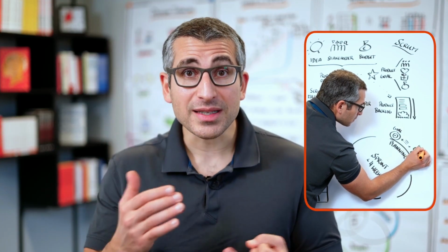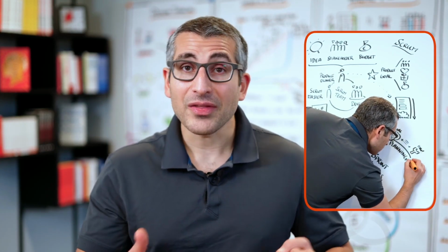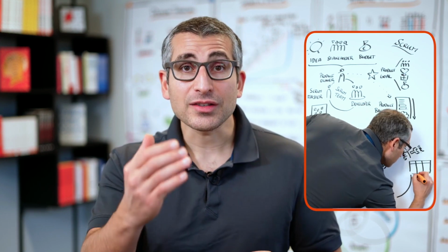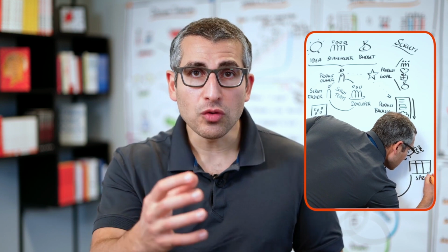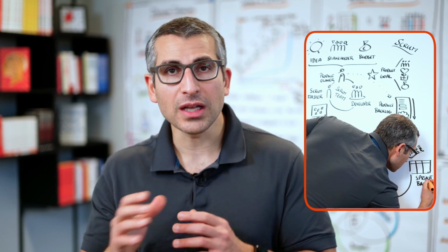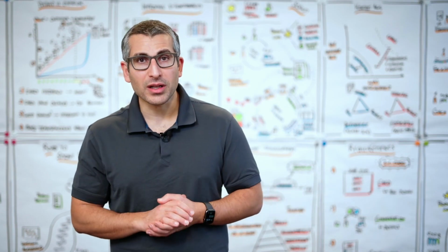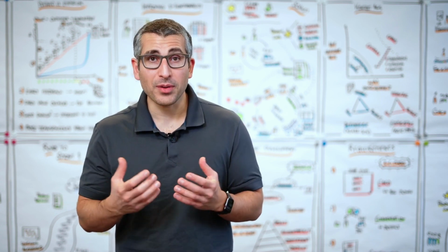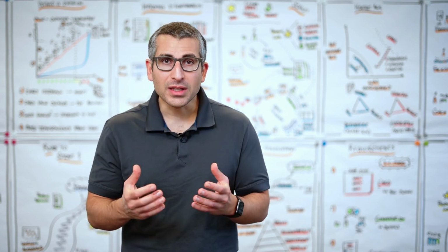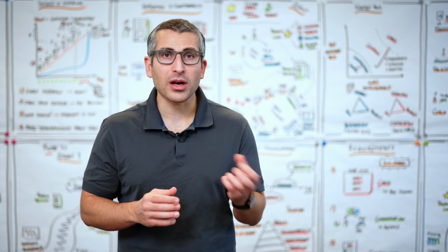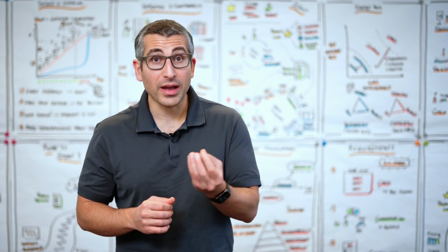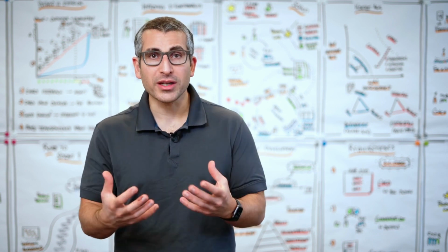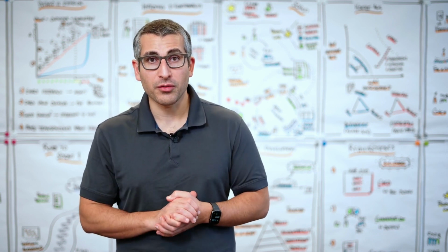Based on the priorities that we have in our product backlog and the capacity we have as developers, the developers select a certain amount of items and move them from the product backlog into the sprint backlog. Last but not least, the developers talk about how they are going to implement those items. Some teams even break down the product backlog items, which are now in the sprint backlog, into individual tasks to create more transparency around how they want to deliver things.